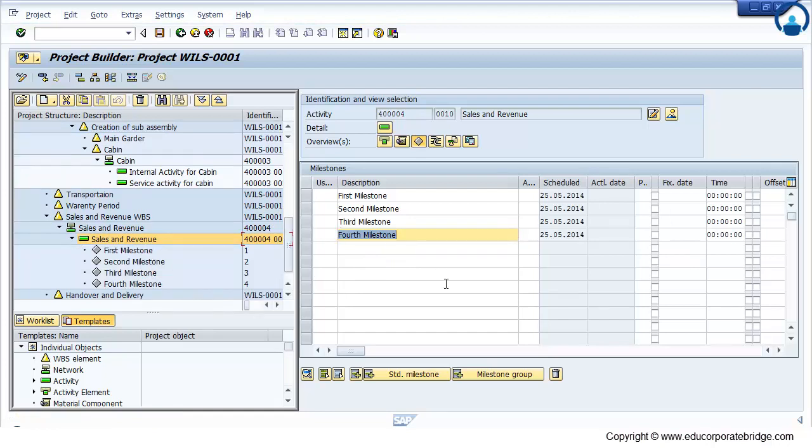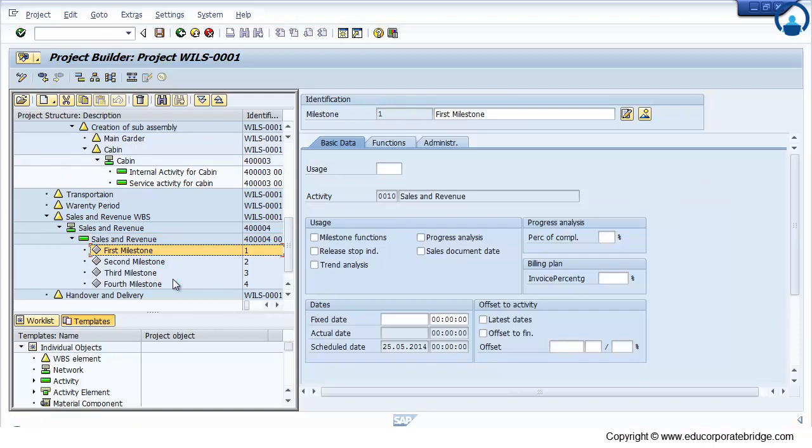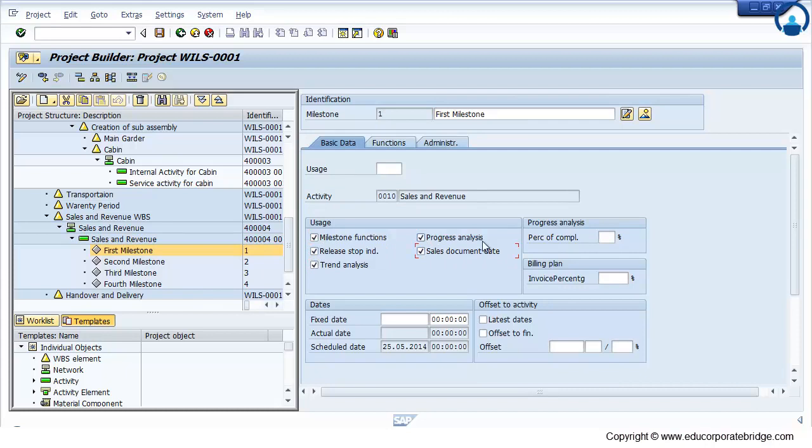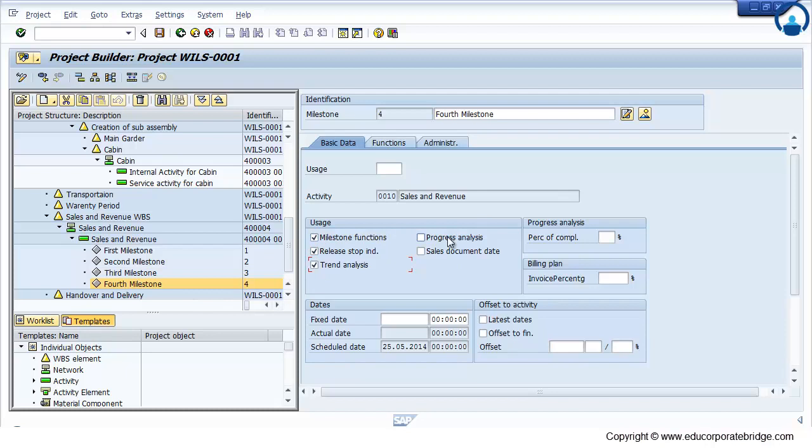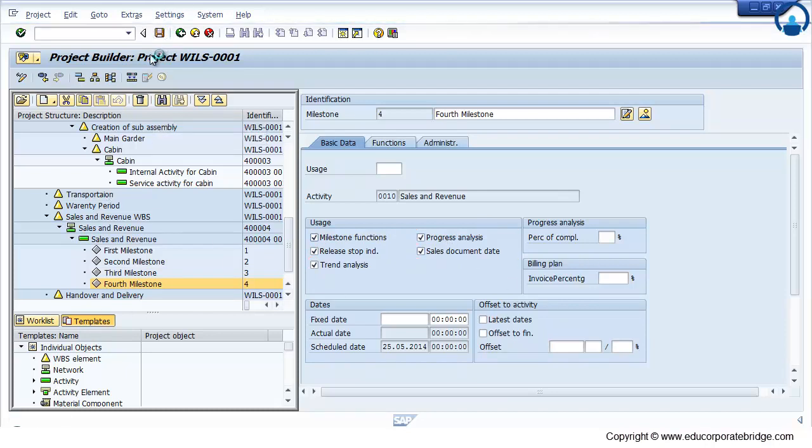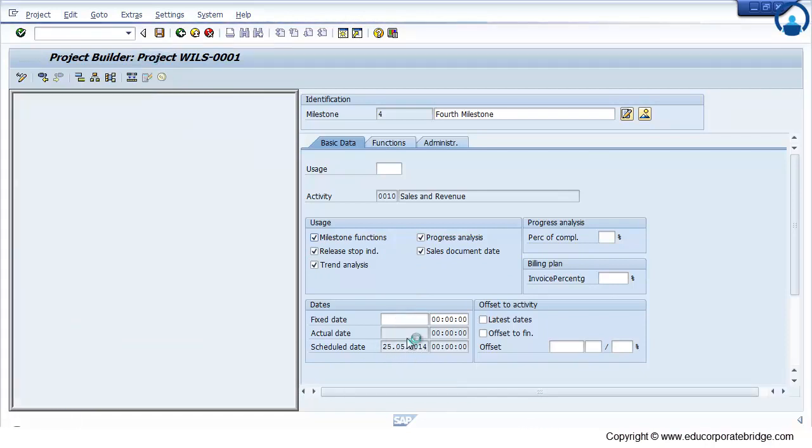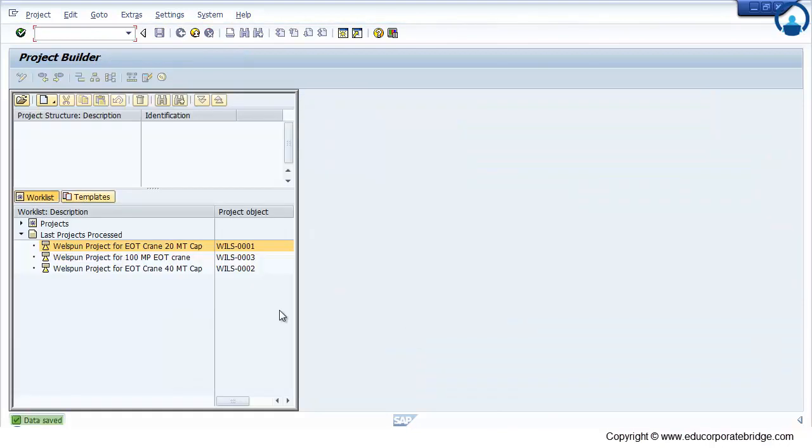So the milestone gets attached on the project. Now if you select the milestone, you can be provided for the usages whether it is for sales or progress analysis. You can also use the invoicing percentage and accordingly it will be linked to your sales order. That is PS and SD power integration. So it has scheduled date. Once you confirm that, it is showing the actual date.